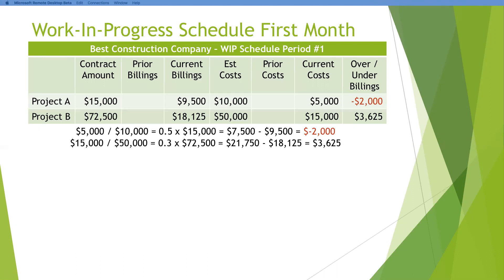Let's do the same math on the second line. We take our actuals, divide by our estimated costs, and come up with 30% complete. We multiply it by what the overall contract was going to be. Even though we only billed $18,125, in the perfect world we would have billed $21,750 — so we've underbilled that one by $3,625. There are sometimes legitimate reasons why we may overbill for mobilization purposes and things like that. But this is just scratching the surface of how these numbers play out when we're putting financial statements together. We'll use that percentage of completion to say what we were over and under billed.